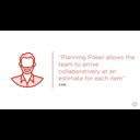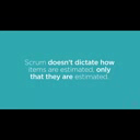But I should add, Alan interjects, that technically the Scrum framework doesn't specify that teams must arrive at estimates using planning poker. Instead, it just requires that all product backlog items have estimates, and that these estimates are given by those who are actually doing the work before any items can be added to the sprint. But that said, many teams have been very successful with planning poker when first adopting Scrum.